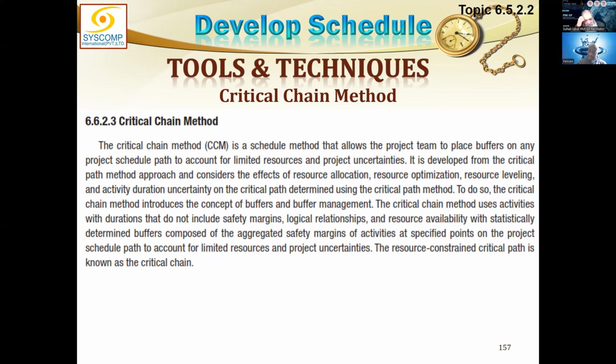For example, you know that at least 50% padding is being done in my organization. So I'm not asking you to slash everything by 50%, but choose a figure. Say you cut everything down to 80%.